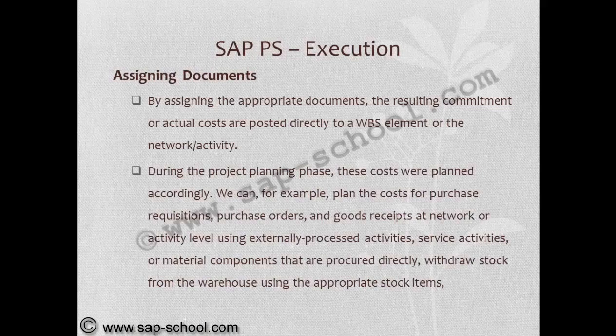During the project planning phase, these costs were planned accordingly. We can, for example, plan the costs for purchase requisitions, purchase orders, and goods received at network or activity level using the externally processed activities. Service activities are material components that are procured directly.